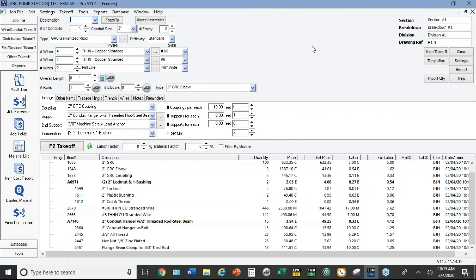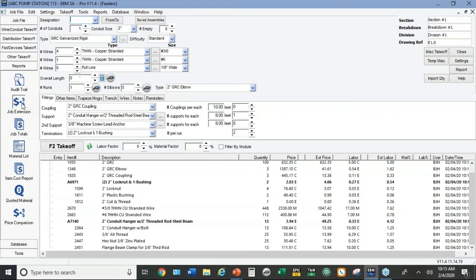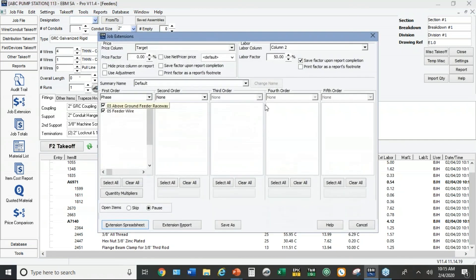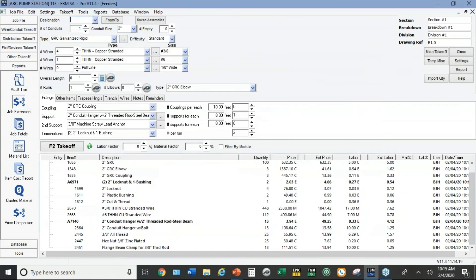Okay. So I've taken off 100 feet of pipe. I'm going to go to job extension. You already saw that the default is to add 50% to labor. So let's just do a quick little example for a multifamily residential.